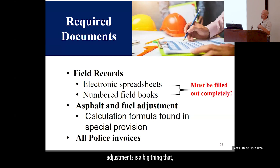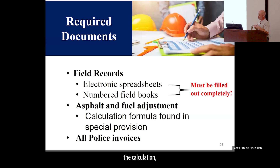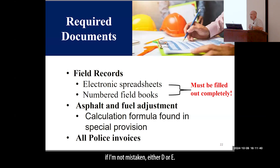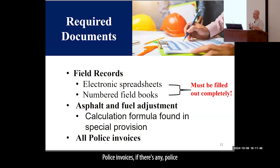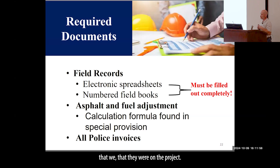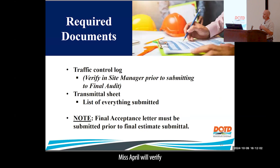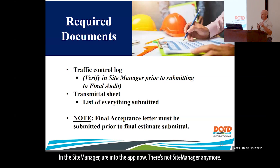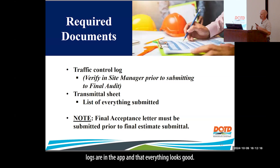Asphalt and fuel adjustments is a big thing we check on. If your project has this, the calculation can be found in a special provision — I think it's under Section 2E now. Police invoices: if there's any police traffic control on the project and you're paying for the police, we need those invoices showing they were on the project. Ms. April will verify that all traffic control logs were entered in the app — they moved it from Site Manager to the app now.